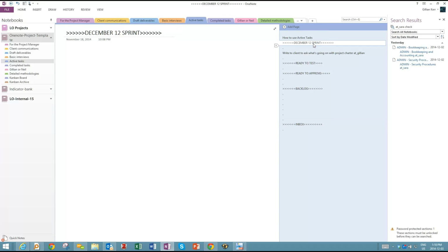We're using agile methodology with sprints because in long projects, what often happens is that you have these tasks that are supposedly in progress for months, and they float around. They demoralize everybody. Nobody knows what's going on. Instead, what we're doing with each project is saying, this is what we're going to do in the next 2 weeks, or at most the next 4 weeks, and everything else stays in the backlog. So backlog is like all the stuff that we're going to do, but we haven't prioritized yet. Okay. Inbox are things that we've collected. They may be rough notes. They haven't even been processed. They may not even be clear tasks yet.